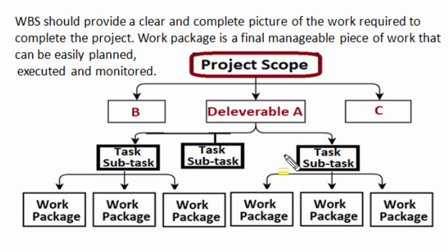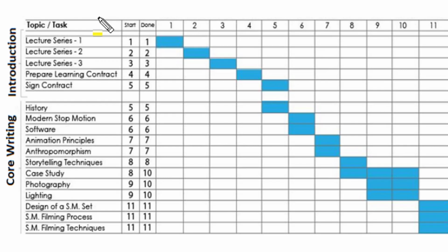Finally, the project scope is decomposed into different deliverables. Deliverables are decomposed into sub-deliverables in terms of tasks and subtasks, and ultimately they are decomposed into work packages for appropriate activities. For better results of the work breakdown structure, we can export or enter the work breakdown structure into a Gantt chart for further scheduling and project tracking. Now the Gantt chart has different work schedules and timelines, and we can link different dependencies of different tasks, and we can also show the key project milestones for monitoring and control of the project with convenience and efficiency.